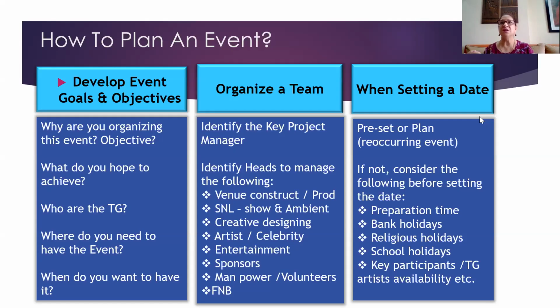Sound is denoted basis the number of people. So the first thing you tell your sound vendor is, I want sound, and he'll say, capacity. The capacity of the venue is one thing. The venue may take 500 people, but your requirement in that 500-capacity venue is just 150. So you have to give the number of people, 150, to the guy, so that he understands what works for this,